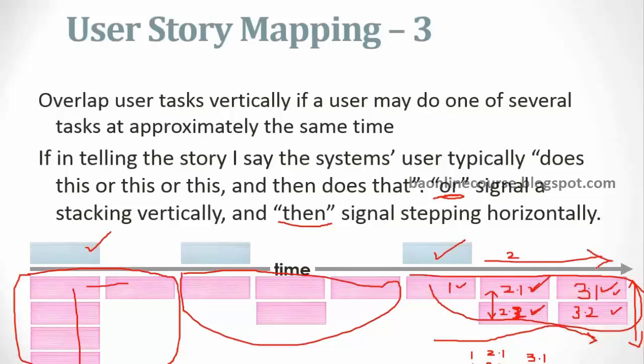Now we have all those detailed work. It's similar to a work breakdown structure, right? So what have we done? We have broken down that requirement or features into smaller ones. And then we have a detailed work breakdown structure kind of thing now. Okay. Now which is a little more organized rather than just a list of activities. Then what we do? Then we would prioritize them.